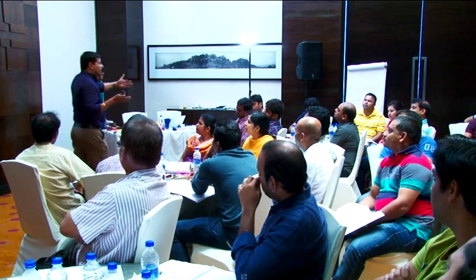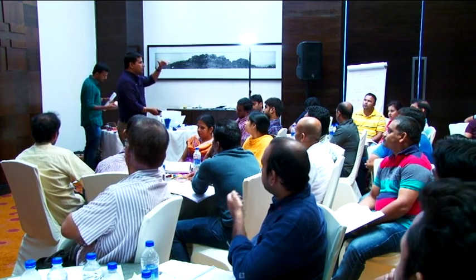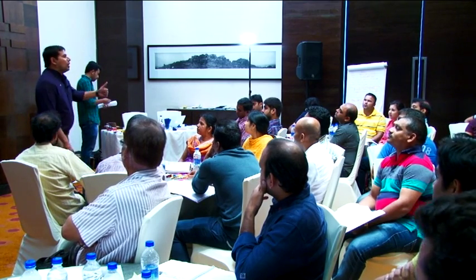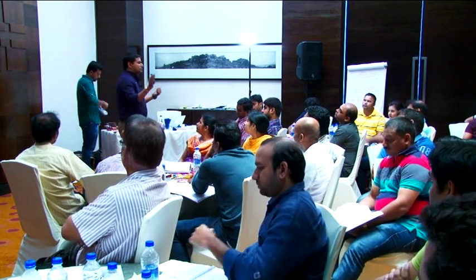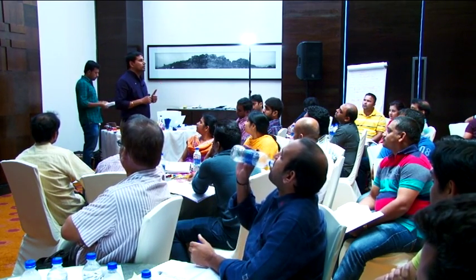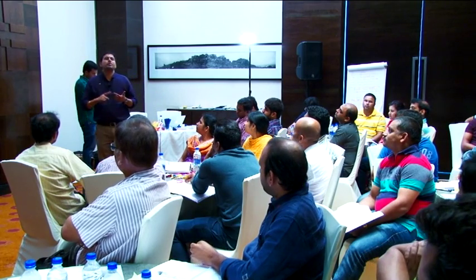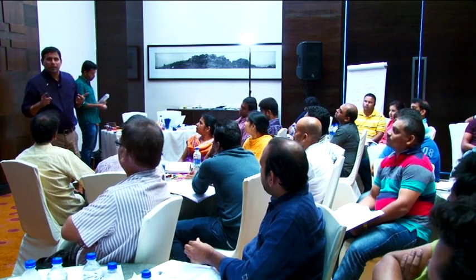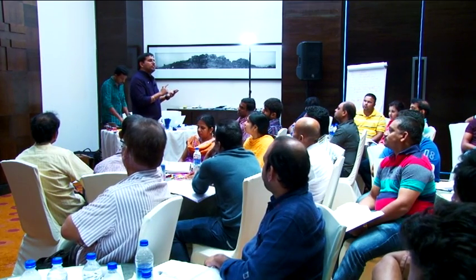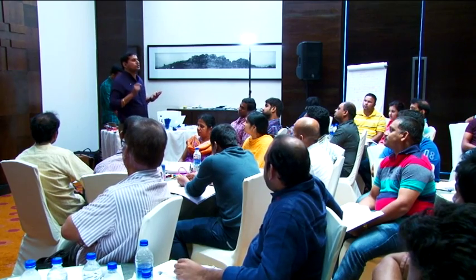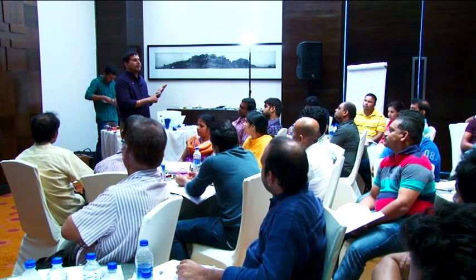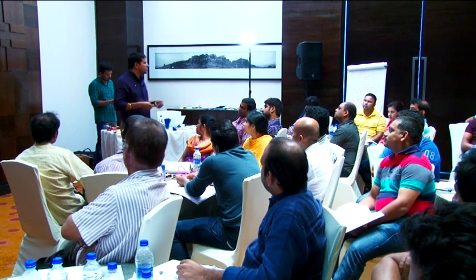Now you are working in a sprint. Now you have a definition of done for the sprint. What criteria you could include in that? All my acceptance tests must pass. My first criteria. Who is giving you the acceptance test? Good. My code should have been reviewed. At least 75% functionality should be automated. No severity, 0 defects found in the testing. Required documentation is created. Maybe these 5 or 6 criteria.